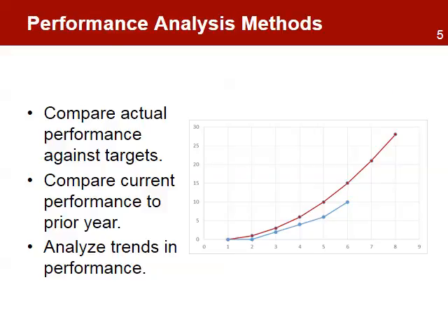There are different methods to analyze performance data. One of the most common methods is deviations from baselines and targets as direct measures of performance. For example, the chart shows that on the 6th month, the project should have completed 15 sessions of water and sanitation workshops, but the data shows that only 10 sessions were completed. At this rate, it may not be possible for the project to complete all sessions by the end of the project.